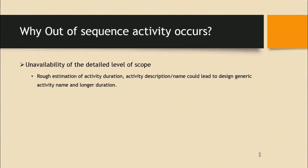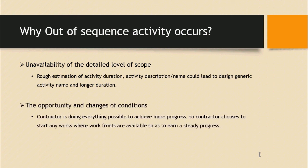Out-of-sequence activities occur due to unavailability of detail in the scope — describing work under one activity with a rough estimated duration. Another reason is that a contractor always tries to achieve maximum progress during the project duration, attacking all available work fronts for steady progress, which might create out-of-sequence activities within the project.